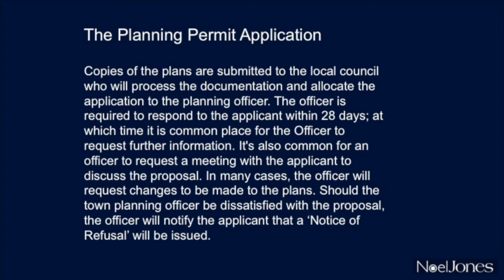The officer is required to respond to the applicant within 28 days, at which time it's common for the officer to request further information. It's also common for an officer to request a meeting with the applicant to discuss the proposal. In many cases, the officer will request changes be made to the plans. Should the town planning officer be dissatisfied with the proposal, the officer will notify the applicant that a notice of refusal will be issued.